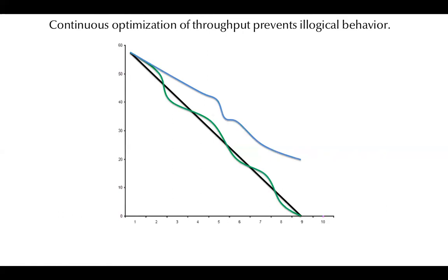It looks like a couple of weeks is about what you'd expect before people's burnout turns into various forms of sick leave and churn and low productivity and rework and all of the sorts of things that happen when you cut corners and go as fast as you can. It's not a sustainable behavior.